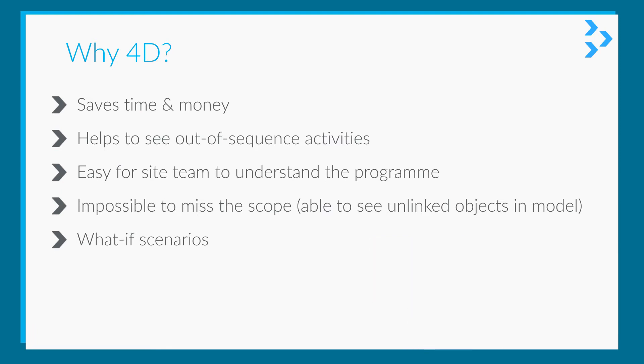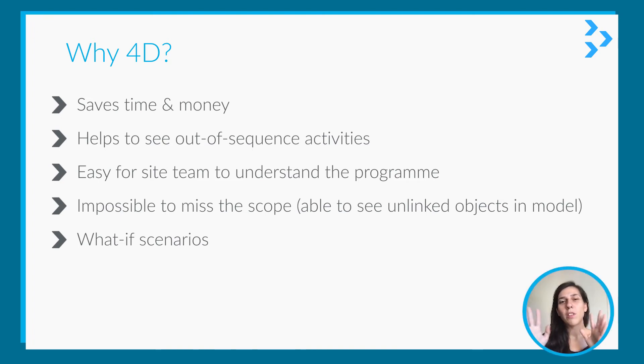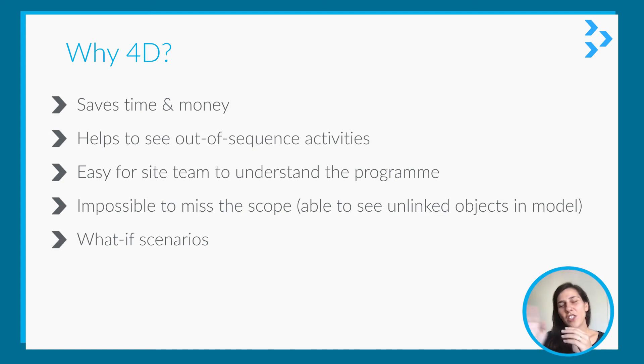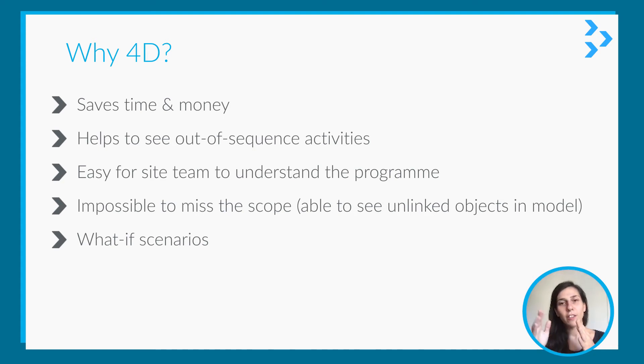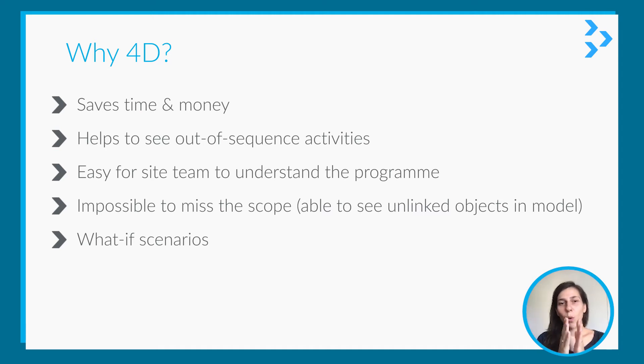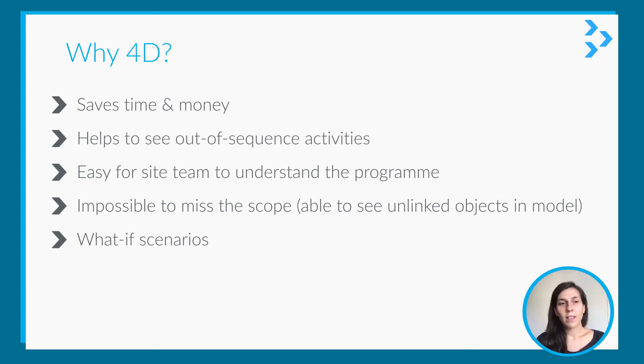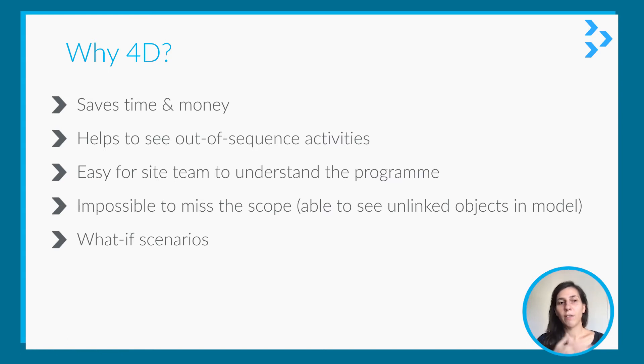In other planning software, you can create what-if scenarios, but you will only be able to see the changes in the end dates. But in this one, you can just move the time slider and you can see where the project will be at a specific time. So I think it's much easier to check what-if scenarios in 4D.